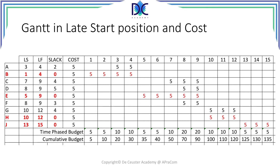The next thing to do is to calculate the planned start Gantt chart, and here we have to be a little careful. Remember what happened with activity A — I extended it from 2 to 4 periods. When we extend the activity, the total cost of the activity doesn't change. The total cost of activity A is 10K.